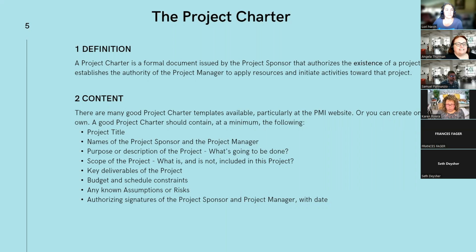And then you want to identify who are the project sponsor and the project manager. And then the purpose or description of the project. You want to be somewhat descriptive here about what's going to be done. Why are we doing this project? And then the scope of the project. Here's where you set the boundaries, what is and is not included in this project. And this is really important, particularly for the benefit of the project manager, to establish the guardrails, if you will, of what's to be accomplished.